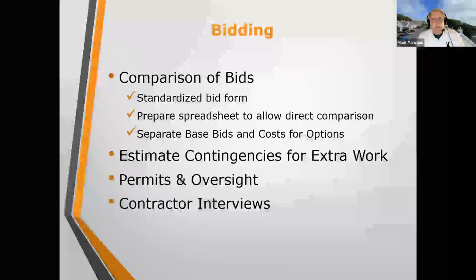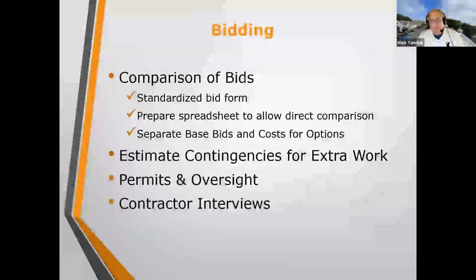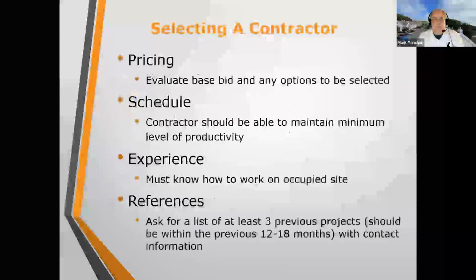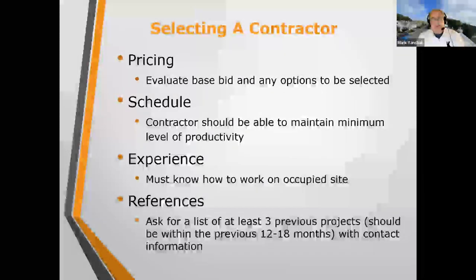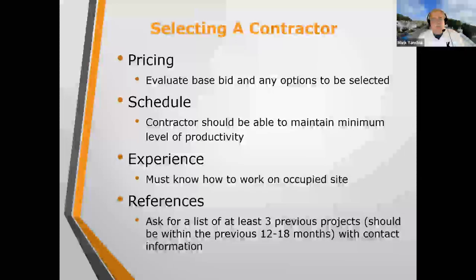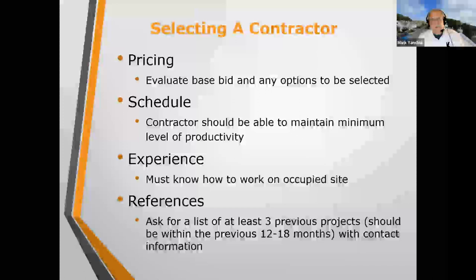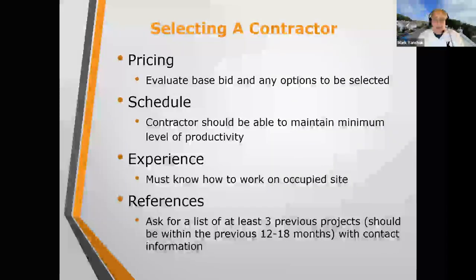When narrowing down to maybe two bidders, you may want to bring them in and interview them to see which you have a better rapport with — even if one price is higher. When evaluating and selecting a contractor, it's not always about price. If the contractors are pre-qualified you can go on price if comfortable, but also evaluate the schedule they're proposing, their experience working in communities, and check their references from recent projects.